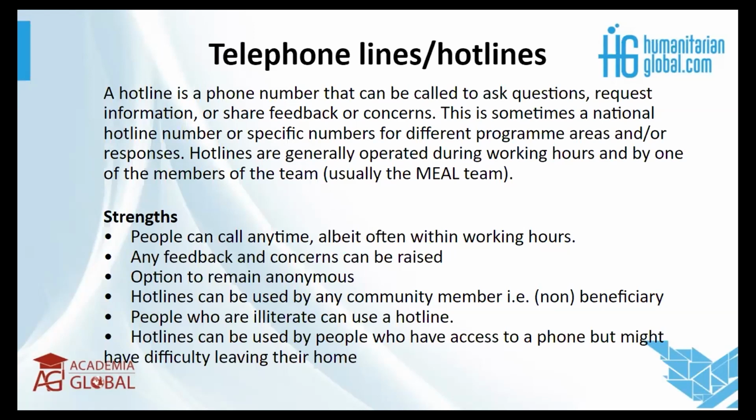So we can speak to the strengths of these telephone lines or hotlines. One is that people can call anytime. Often it's usually within working hours, because as I've stated, unless it's a national hotline, normally it's difficult to have someone on call 24/7. There are times when it's possible. However, it should be very explicit, even in your communication, which hours the number is reachable. Remember also to keep in mind that these community members could be having troubles at night, or early in the morning, before the working hours. So it's important that this is discussed before implementing this as one of your feedback mechanisms, or the type of feedback to receive.